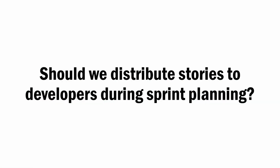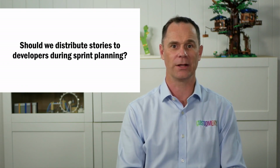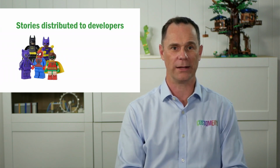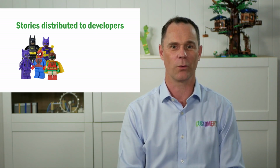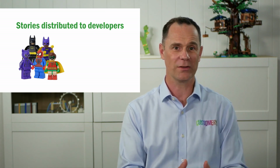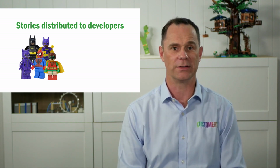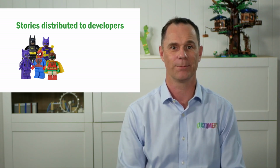Should we distribute or assign user stories to developers during sprint planning? Or should user stories remain unassigned so that developers can pick up work as soon as they have capacity during the sprint? If the stories are being distributed among the developers by the developers, then it doesn't matter whether stories are distributed or assigned during sprint planning or during the course of the sprint. Distributing stories during sprint planning can be helpful to check for capacity and skills. It's important though that the distribution isn't fixed, that it remains fluid and can change during the sprint.